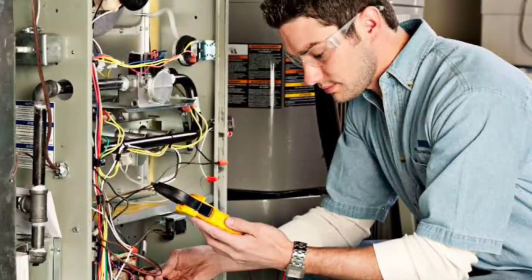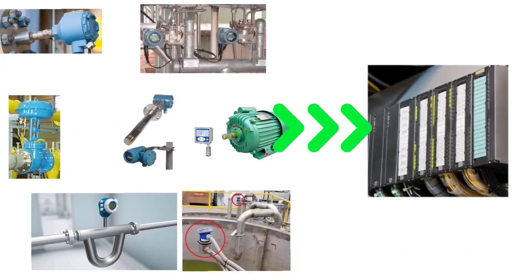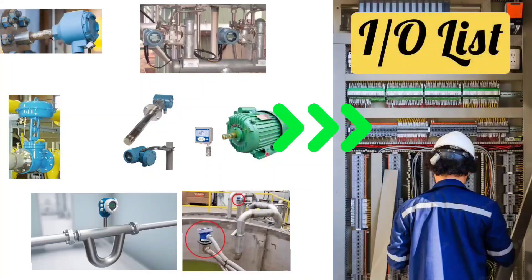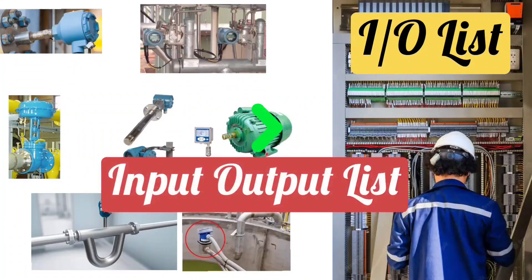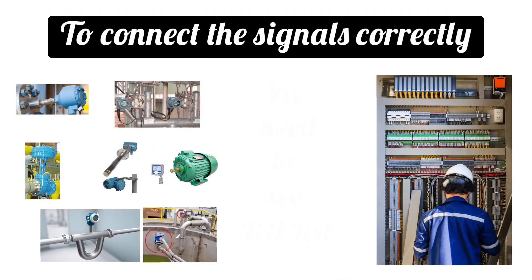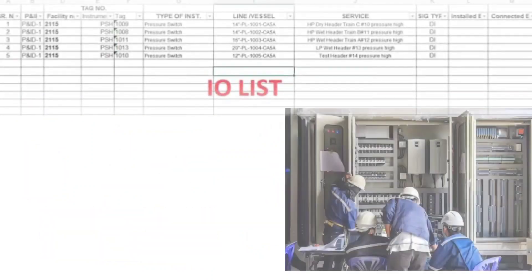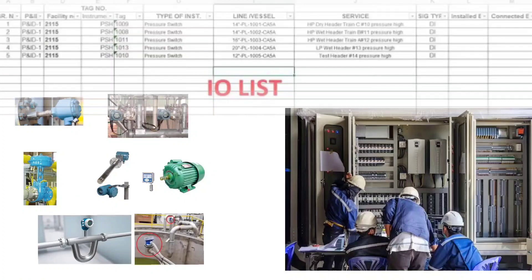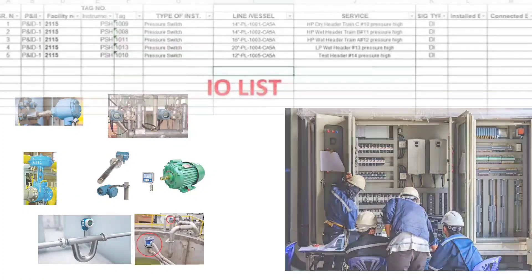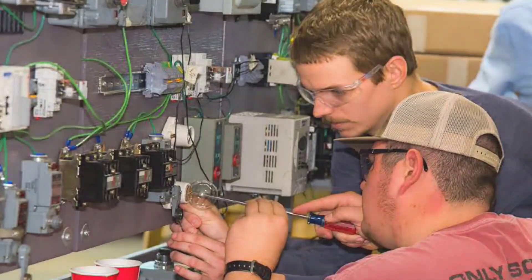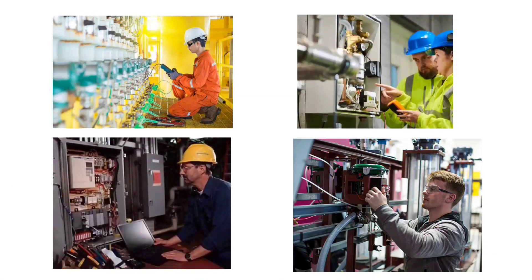All these signals are properly connected. To connect signals at the right place, an I/O list is required. This I/O list is called the input-output list. To connect the signals correctly, we need to see the input-output list. From this list, you get to know which instrument is connected where in the PLC panel. By commissioning, you know how to connect the instruments properly.